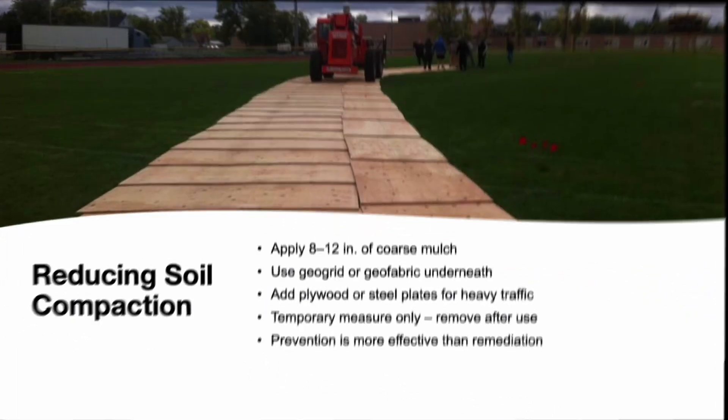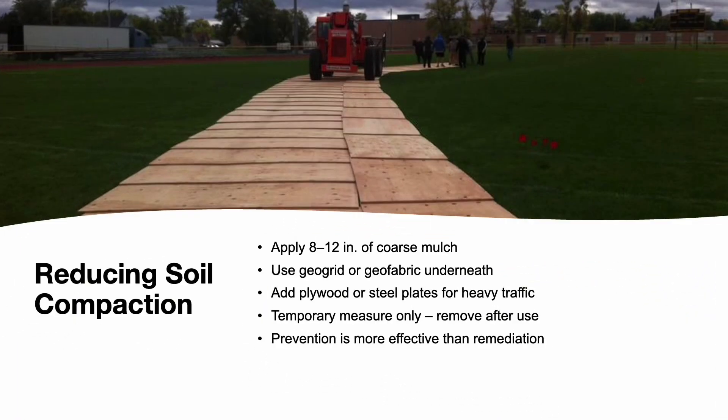Soil compaction is a major threat to tree health during construction. To reduce this, spread 8 to 12 inches of coarse mulch like wood chips around the trees. For added protection and easier cleanup, place geofabric underneath. Further weight distribution can be achieved with plywood, steel plates, or trackway systems. Remember, this mulch layer is temporary — it should be reduced or removed post-construction to avoid suffocating the root zone. Preventing compaction is always easier than fixing it later.